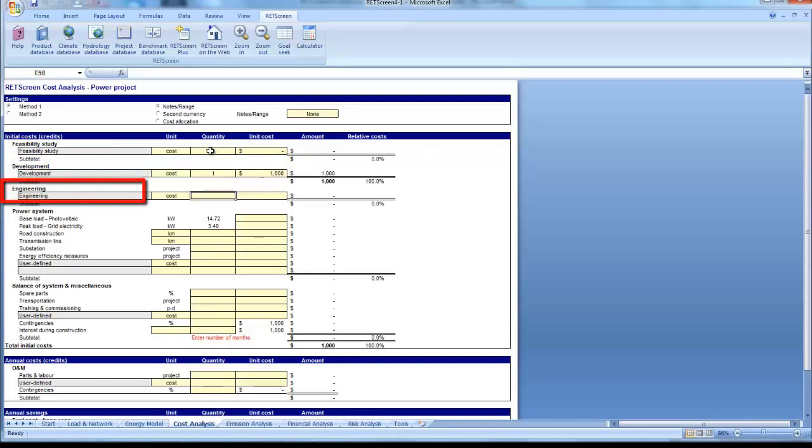The engineering phase includes costs for the proposed case project site and building design, mechanical design, electrical design, civil design, tenders and contracting, and construction supervision. If the project is awarded on a design-build basis, then all of these costs would be included in the prices provided by the equipment supplier or contractor responsible for the project. If the project is awarded by tender based on specifications prepared by a consultant, then there will be engineering charges from the consultant overseeing the projects and perhaps the equipment supplier.